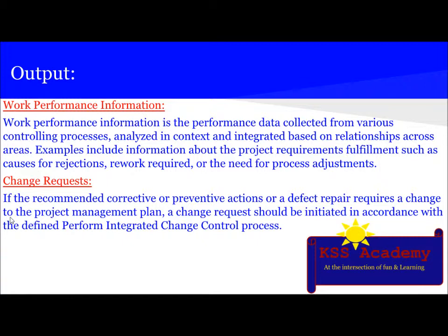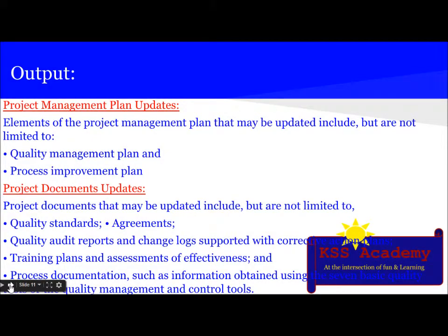Next output is change requests. If recommended corrective or preventive action or defect repair requires a change to the project management plan, a change request should be initiated in accordance with the defined Perform Integrated Change Control process. The next output is project management plan updates.